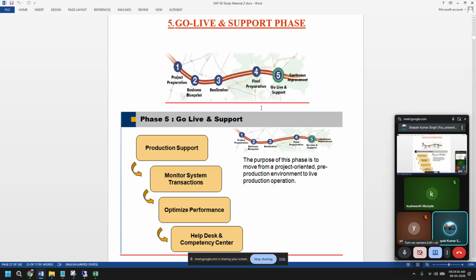We do some small config, let's say a 2 month period. We develop something, then at the end of 2 months we show it to the business: this is how I have configured. Not only that, let's say there is a 2 month period we decided, then we further divide that period into some weeks. That we call an iteration, first iteration, second iteration, or a sprint.